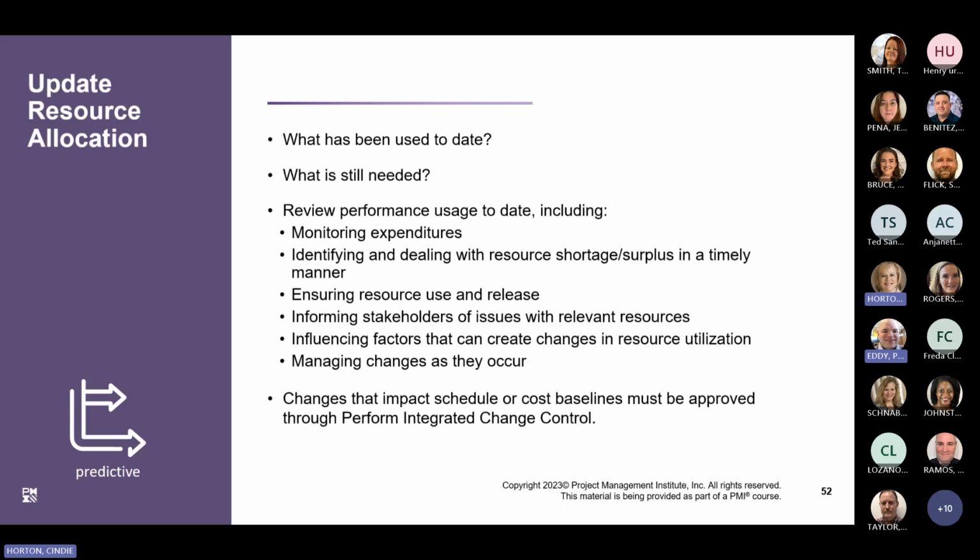So to manage the physical resources, you need to understand what has been used and what is still needed at any point in time. This includes reviewing the usage and whether it is in alignment as planned. Monitoring the usage of resources is directly tied to the cost for these resources. Monitoring also indicates whether additional resources will be required in addition to those initially identified. This is critical if there is a potential delay in acquiring additional items. It also addresses how to handle releasing or removing excess supplies when no longer required.